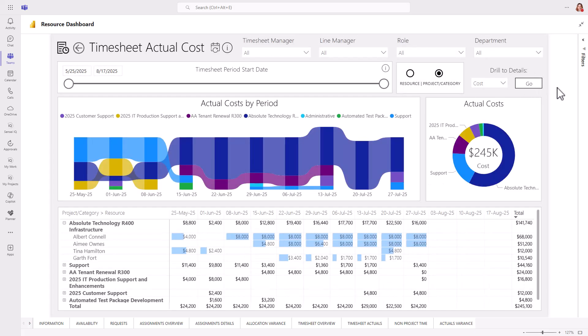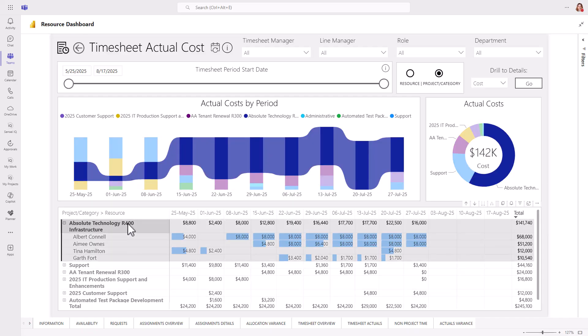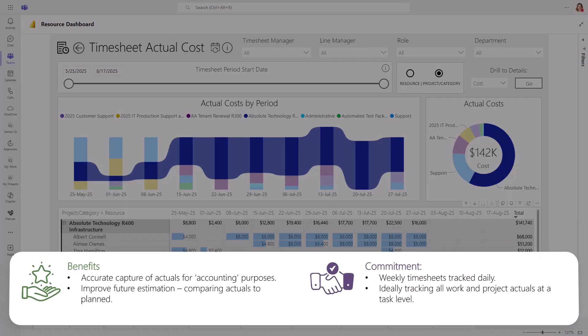If you maintain cost rates for your resources, then you will also be able to see how much the time tracked actually cost each project. Likewise, if you maintain sell rates, then you'll also see the cost to the client and your own margin. The primary benefit of timesheets is the accurate capture of actuals for accounting purposes. But you can also use it to improve future estimation by comparing your actuals to the original plan. To be successful, it does require a commitment to weekly timesheets tracked at a daily level. Ideally, you are also tracking at a task level, not just at the project level.